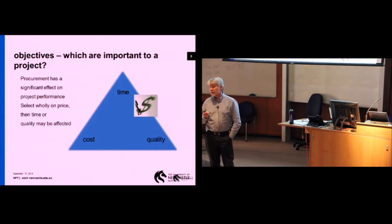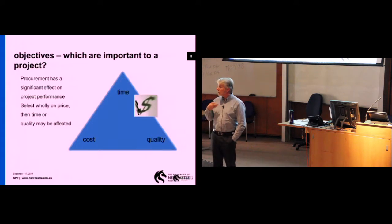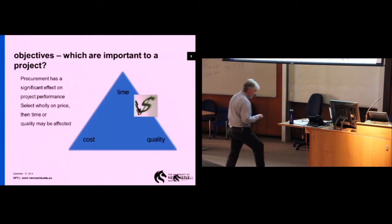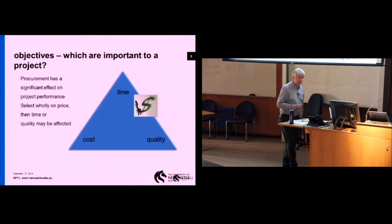For example, if time is up the top and quality is here, a move toward time could be something like an Olympics, an Olympic Games. You can't change the date when the Olympics starts, so you have to focus on the time. In an Olympics, there's a great deal of community pride, national pride involved, so you want it to be a quality type of project. So by moving that dollar sign symbol around, you can review the types of projects.